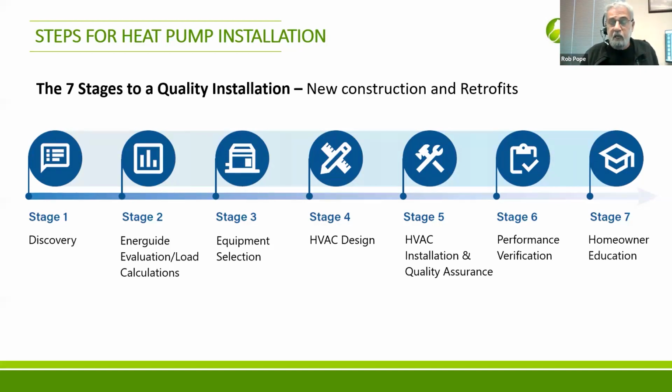Now in a new build, that's an actual design. It's a blueprint, drawings, pointing out where ducting is going, its sizing and all that kind of stuff. In a retrofit, it's at least: this is the plan, this is the specifications. This is how we're going to take that system out and put the new system in. And this is what it's going to look like. This is where we're going to put the outdoor unit. This is where we're running the refrigerant lines, and so on. The installation itself, we'll talk about that more later.